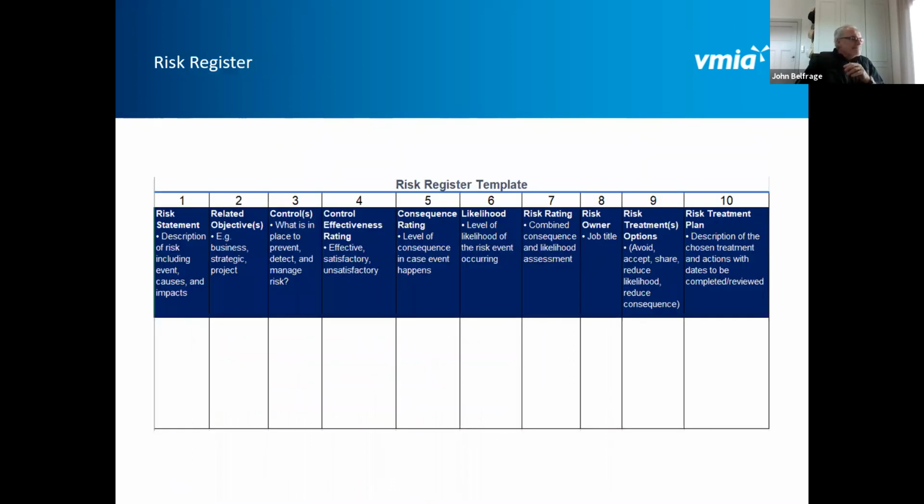Next slide, please. So this slide really includes those data items that we believe should feature as a minimum in a risk register, these 10 elements. They can be populated using summary information and hyperlink to other source documents such as risk treatment plans. You can also use simple dashboards with data extracted from the risk register to demonstrate trends that arise from the effective treatment of the risk.